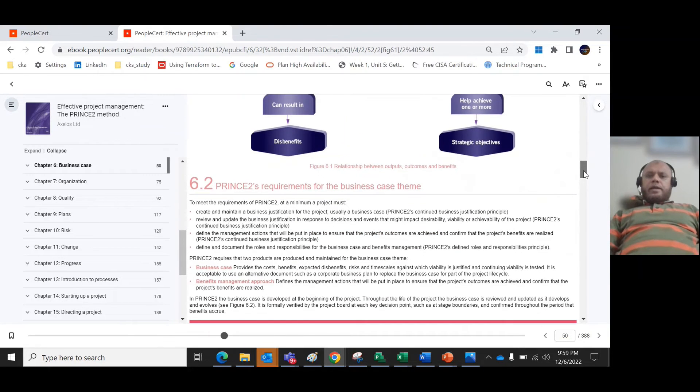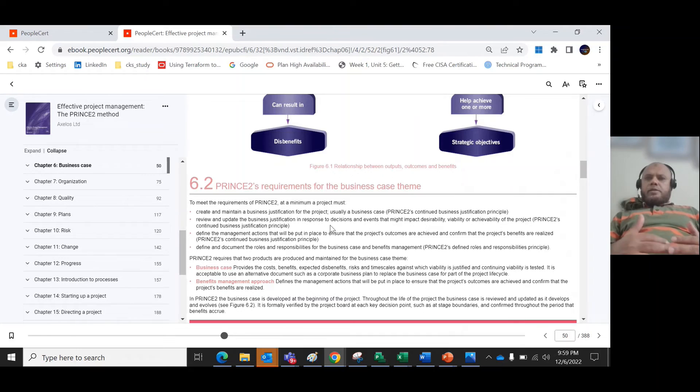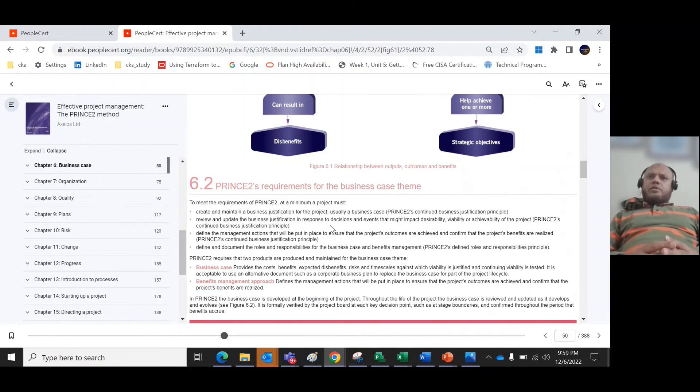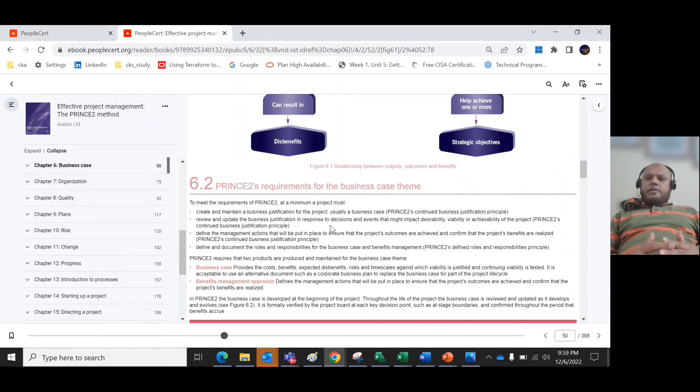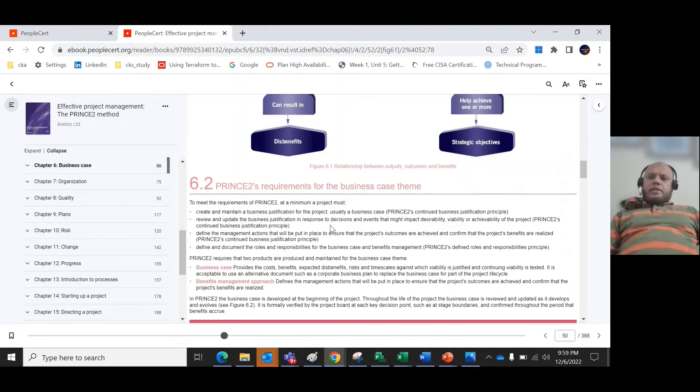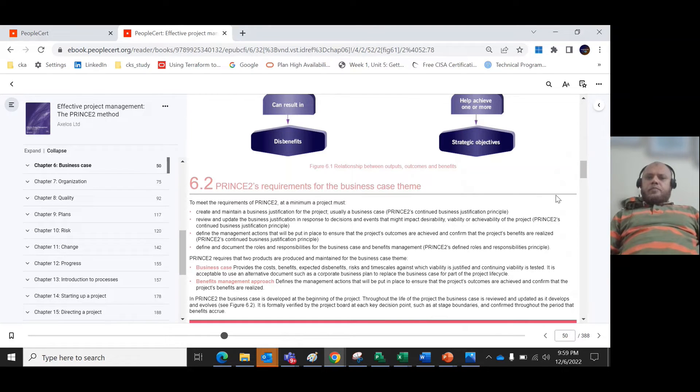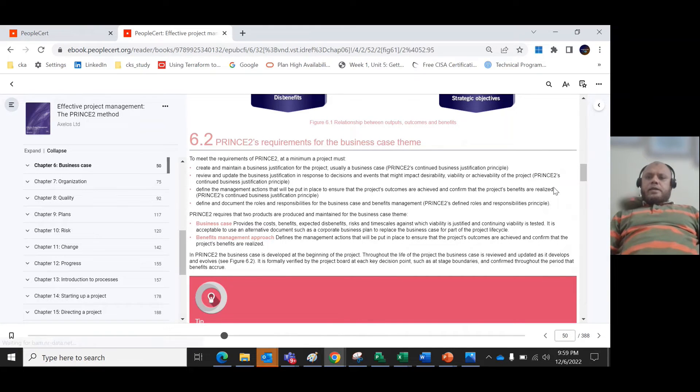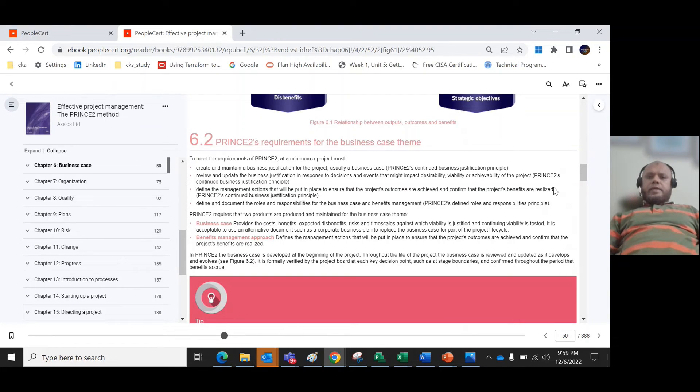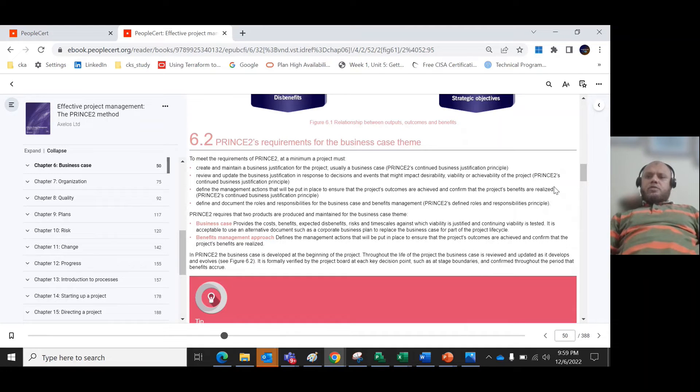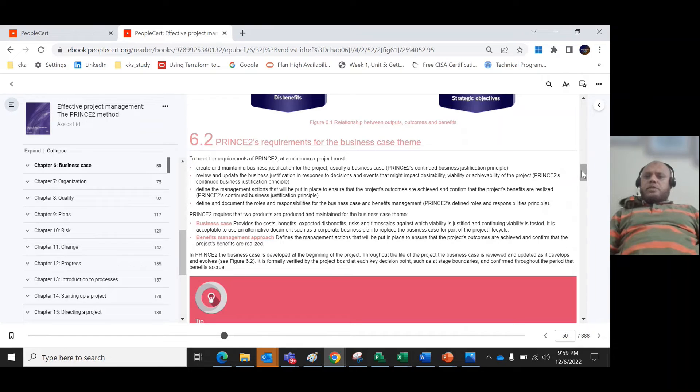What are the requirements for the business case theme? In the beginning I mentioned that you make a project because you have some desired outcome. That's why you need to create and maintain a business justification for the project. PRINCE2 continues the business justification principle and reviews and updates the business justification in response to decisions and events that might impact desirability, viability and achievability of the project. Define management actions that will be put in place to ensure that the project's outcomes are achieved and confirm that project benefits are realized.